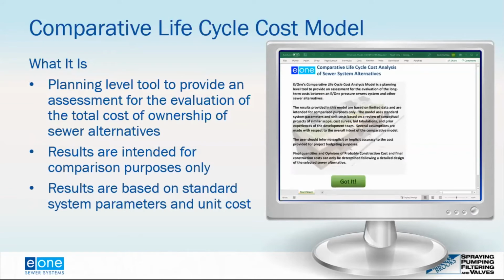Now the model we have is set up as something that's intended for comparison purposes only. It is based on standard industry practices, rough estimates, to be frank, guesses, and some other assessments. So it's not something that you want to take the results and set aside as your contract budget. It's not a 100% design opinion of probable construction cost estimate. It just gives you the tool to do the evaluation.